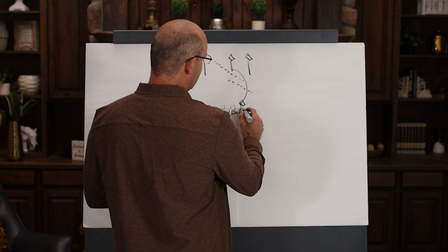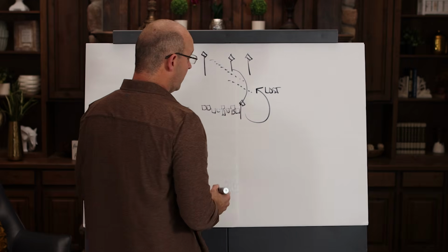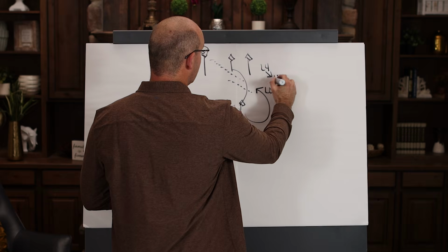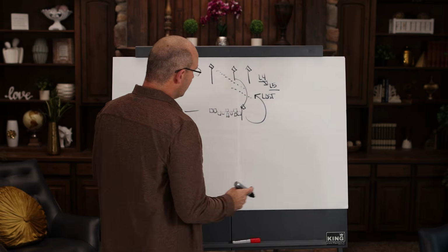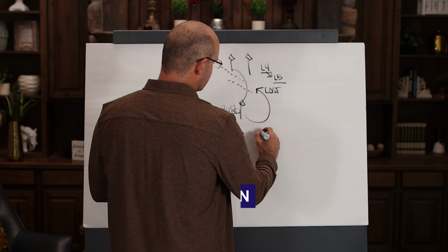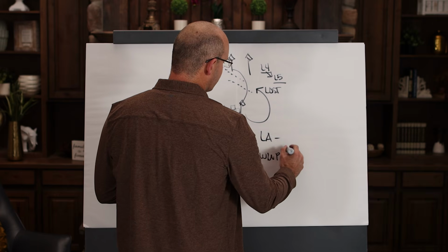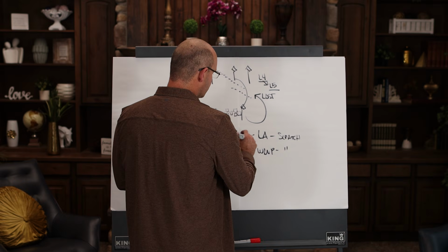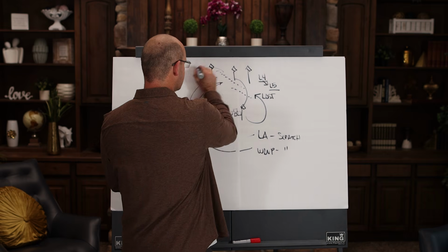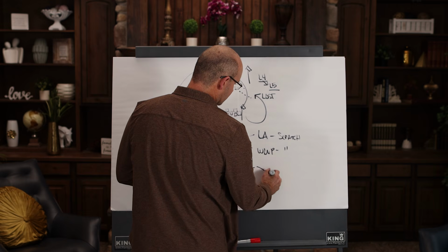And then they will say, take this pull plan and loop it back into the CPM. In that way, it gets lost and your CPM becomes a level 4, verging on a level 5, and now it's unmanageable. Then what will happen is because it's lost in here, the scheduling team will typically say, your look ahead and your weekly work plan, go ahead and create those from scratch and then use those, you're going to love this, and have those educate the CPM so that the CPM can then export your new weekly work plan that's given to the trades.